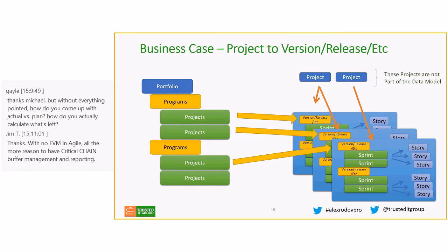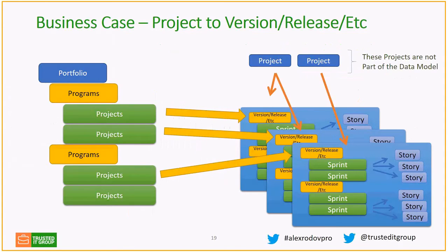So consider the team, right? You have 5 people, and the sprint is 1 week, right? 1 week, each person works 40 hours a week, right? 40 hours times 5, you get 200 hours per your sprint. So on the PPM, you have all of them assigned for this week for 40 hours each on that sprint.